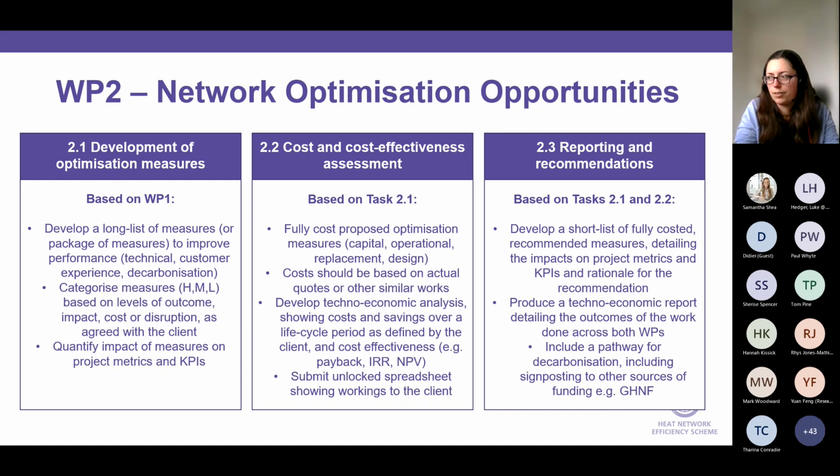And ultimately what we want then is a techno-economic analysis. And that would essentially show the costs and savings over the life cycle period, and the cost effectiveness. So that could be around payback, it could be IRR or NPV. And ultimately, the output of this is that the client will get a spreadsheet that's unlocked, so they can see all the workings, all the calculations that have gone into it. They can really interrogate it further if they want, showing all the workings that you've put in to come up with this techno-economic analysis.